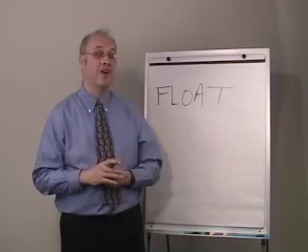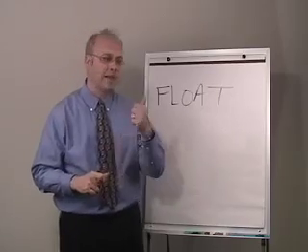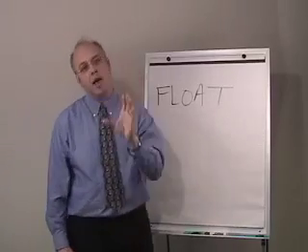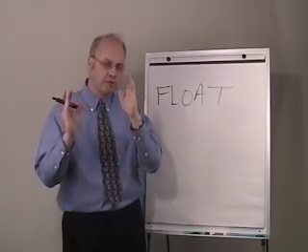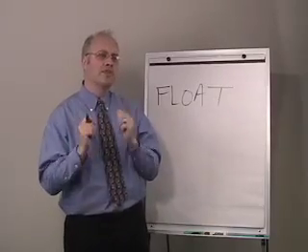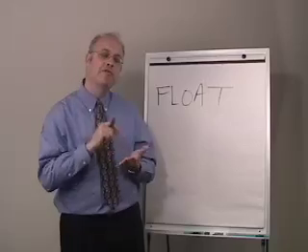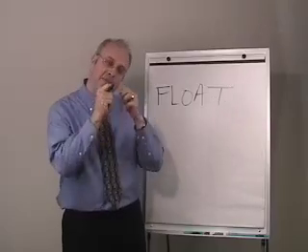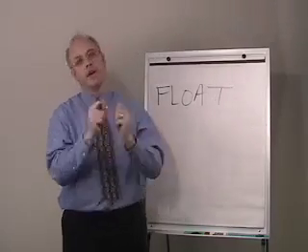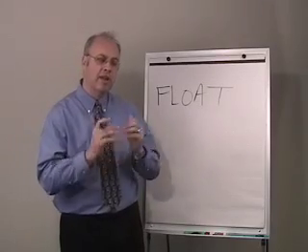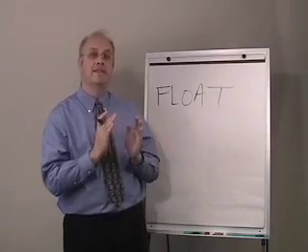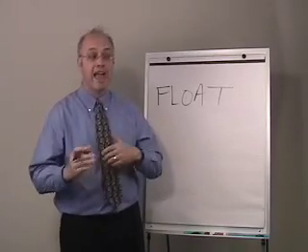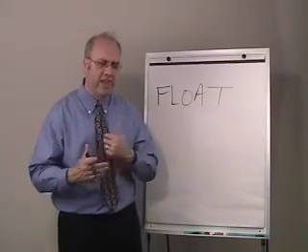Now, there are some contracts that are not written that way. Certainly some contracts say, for example, that the contractor owns the float. A common provision, for example, would be a subcontractor provision. In other words, a provision between a general contractor and a subcontractor, where the schedule says that the subcontractor has to start and finish all their work by the early start and finish dates in the schedule. That essentially means that the subcontractor cannot use the float associated with those activities in performing their work. They must start them on early dates and finish by the early dates, meaning that there is no float available to that work and that they don't own a portion of the float.